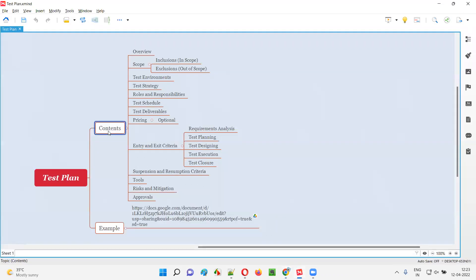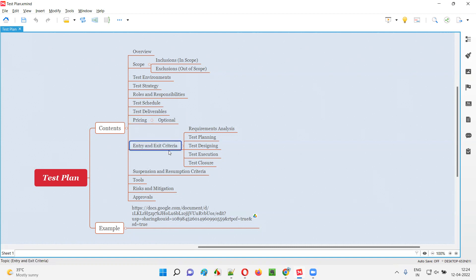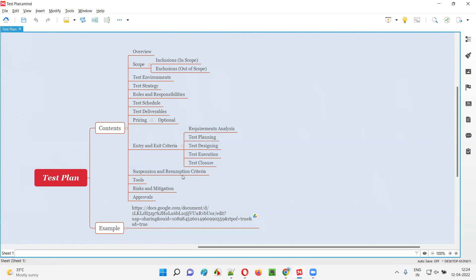A test plan contains several contents like overview and scope. Scope can be further classified into inclusions and exclusions. Inclusions stand for in-scope functionalities; exclusions stand for out-of-scope functionalities. Then we have test environments, test strategy, roles and responsibilities, a schedule, test deliverables, and pricing, which is optional. We also have entry and exit criteria for the different phases of STLC — requirement analysis phase, test planning phase, test designing phase, test execution phase, and test closure phase. Then we have suspension and resumption criteria, list of tools, risk and mitigations, and approvals.